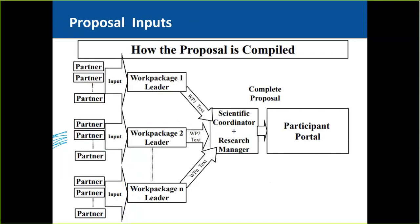The proposal is structured into different work packages. Each work package has a work package leader and is assigned to different partners — for example, Partner A may be involved in work packages one and three, while Partner B is involved only in work package two. There are typically between eight and nine work packages, each contributing to the final proposal submitted by the coordinator.